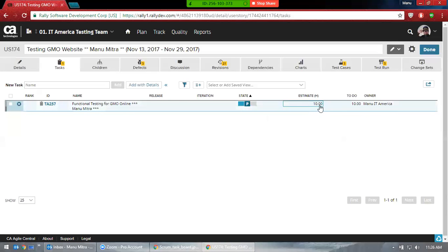Okay, and this is the time. Let's say you have defined some time, here in hours, 10 hours, but it required more time for you. You need to specify 11 hours here, because it took more time. So that's the reason for having this task. Because if you are putting in this task, you can decide, not just the state but also your time: how much time you are utilizing for each task. Based on that, your boss will be allocating work for you. So that's more important.